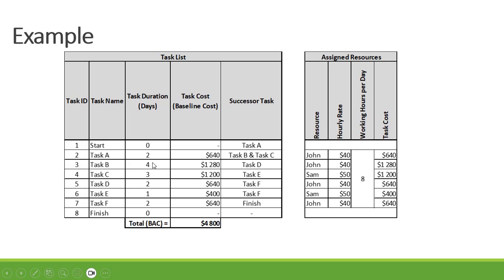John is also assigned to task B at $40 per hour, so it's 40 times 8 = 320, times 4 = $1,280. Sam is assigned to task C at $50 per hour, so 50 times 8 = 400, times 3 = $1,200. Then John is also assigned to task D, so it's 40 times 8 = 320, times 2 = $640.